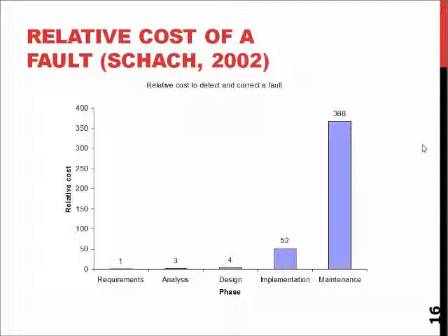of one fault. So this more or less means: how much does it cost to correct one fault from your software? One fault, which might be one bad requirement, or one error in one line of code, or whatever. If you pay €1 for that problem to be fixed in your requirements documentation, simply by getting rid of one thing or changing it to something that functions, in the analysis and design phase, you more or less pay a couple of euros more because you have to then backtrack that every other requirement functions with the correct one. But that's actually nothing, because from the design to implementation, there's a 12 time